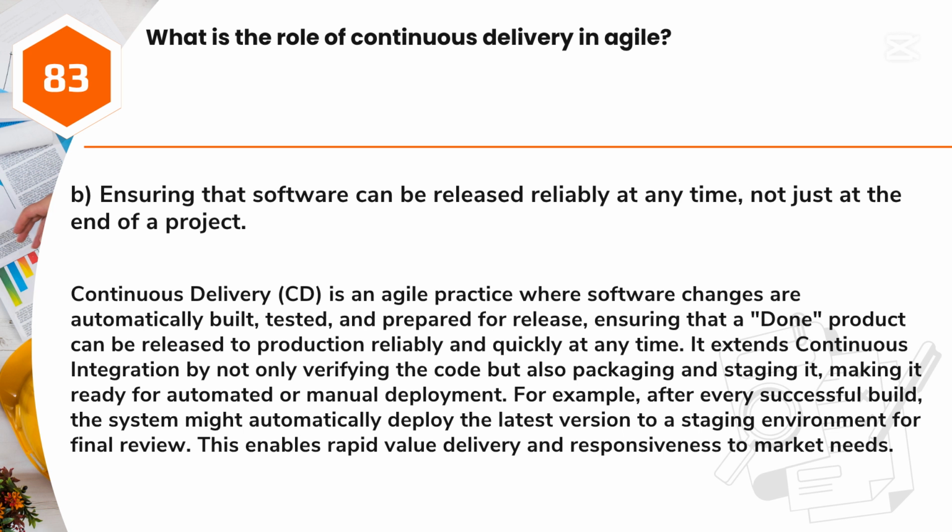Continuous delivery, CD, is an Agile practice where software changes are automatically built, tested, and prepared for release, ensuring that a done product can be released to production reliably and quickly at any time. It extends continuous integration by not only verifying the code but also packaging and staging it, making it ready for automated or manual deployment. For example, after every successful build, the system might automatically deploy the latest version to a staging environment for final review. This enables rapid value delivery and responsiveness to market needs.